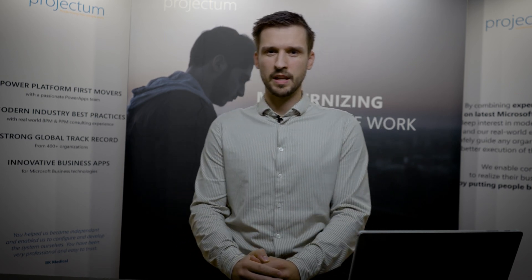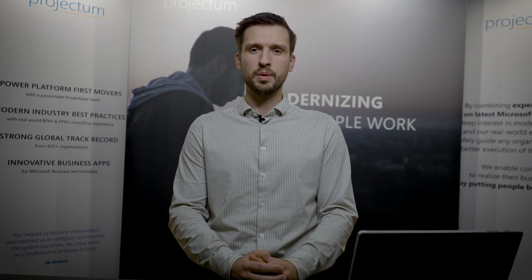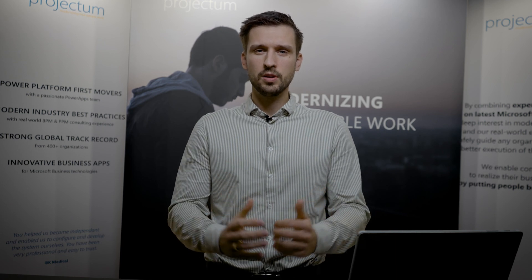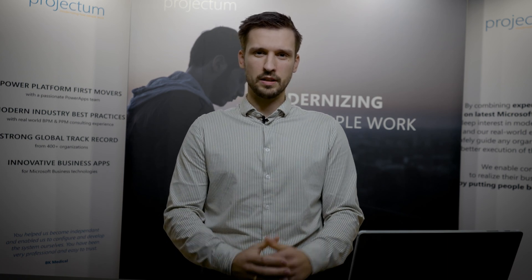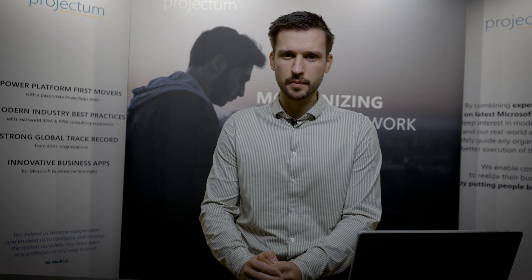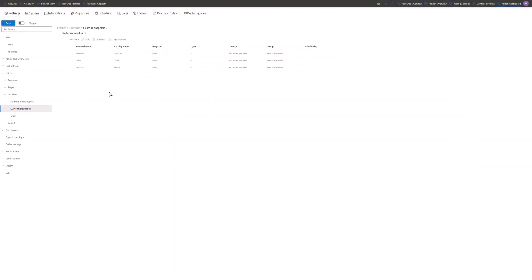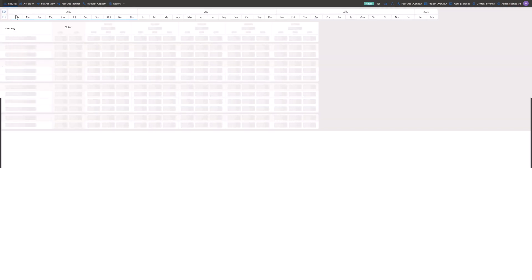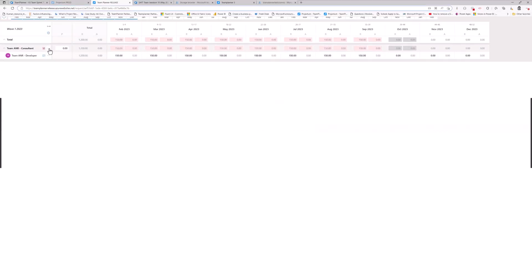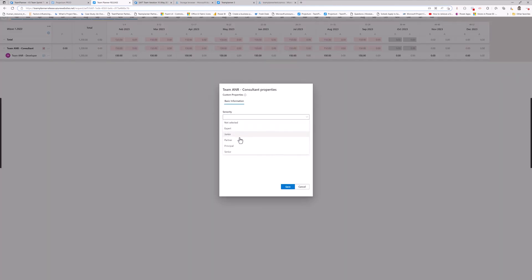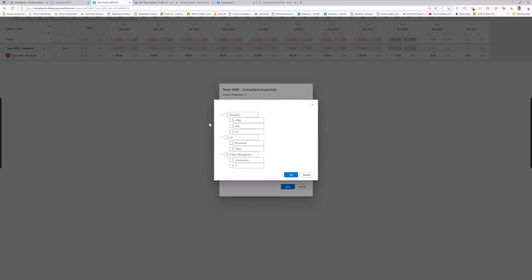It allows the project manager to say, I'm requesting a developer. Then I'm adding properties — like seniority, which could be senior or junior. The skill set needs to be an HTML developer, and it could be a specific location like Denmark or Norway. This is done by enabling the contract properties, setting up the properties that I'm allowed to put in on a request. Then on a request level, you can go in and add the contract properties — when requesting a developer, go into contract properties, add the seniority, the skill set, and maybe also the location.